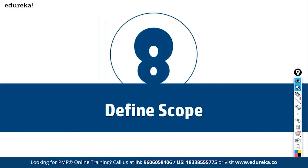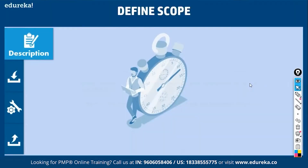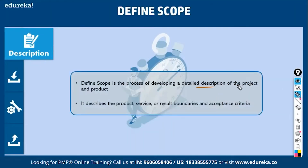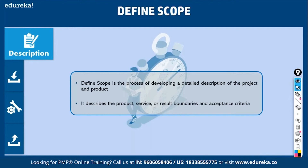Now we have gathered requirements, so the next step is to define scope — a very important document. In define scope, you come with a detailed description of the project and product. You describe what the product features are — the product, service, or result boundaries and acceptance criteria. Acceptance criteria specifies the set of conditions you must prove to get the scope accepted by the customer. If something doesn't get into scope, it won't get into the project, so you must not omit anything.